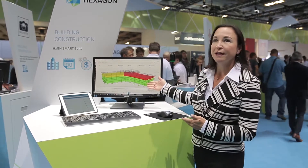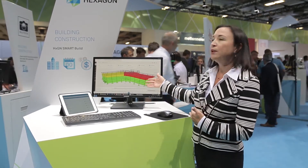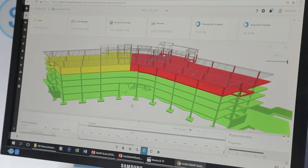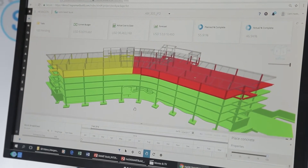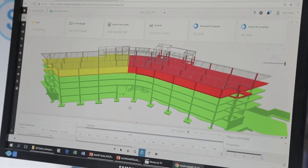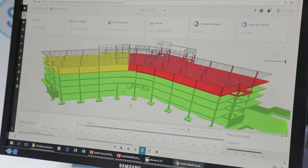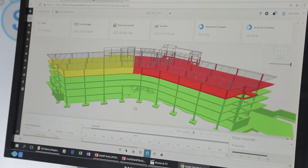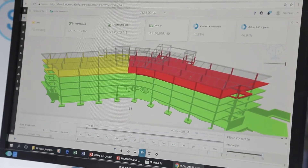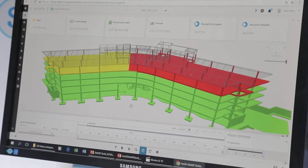Here on the screen we have a model of a building project and we're seeing the color-coded progress. This tells us that the building progress is up to the fourth floor. The fourth floor north slab is yellow, which indicates that we have schedule slippage, and the red indicates that we're behind schedule. This 3D view gives a very quick visual look at our project — not only for schedule progress but also for cost performance.